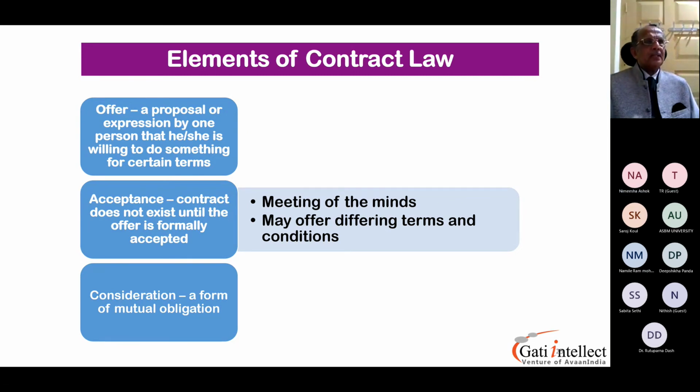Okay, ask me questions. Let me repeat. You have initially sent the request called an RFQ, not an RFP. It's a request for quotation you have asked of a supplier you have identified in France. Then the supplier in France responds to you with a performa invoice. I said at that point of time, it is not a commercial invoice because the transaction is not over. So it's called a performa invoice. Everything is detailed there.